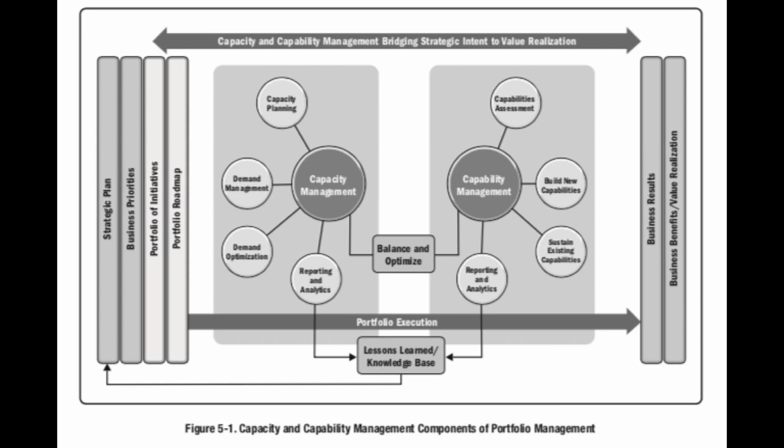You might choose to invest in training those engineers to build that skill set. But in doing so, you temporarily reduce capacity, because those individuals will need to step away from active projects to train. This leads us to the trade-off.